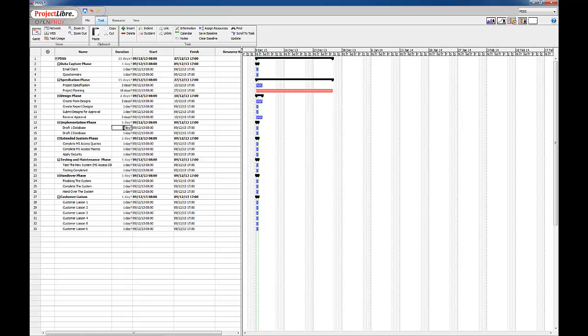To complete the first draft database, we need 20 days, and also we need 10 days to make the changes and complete basically the database system. Complete the Microsoft Access queries, so we need 2 days. The macros, I'm going to put 5 days here. The queries, I think we'll need 2 days. This will do. The macros 5 days. Let's put 10 days for the macros, so we can put some extra functionality there.